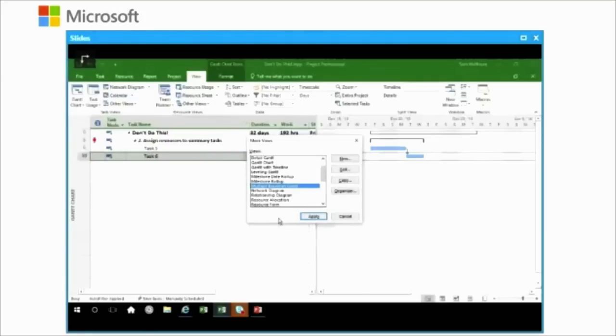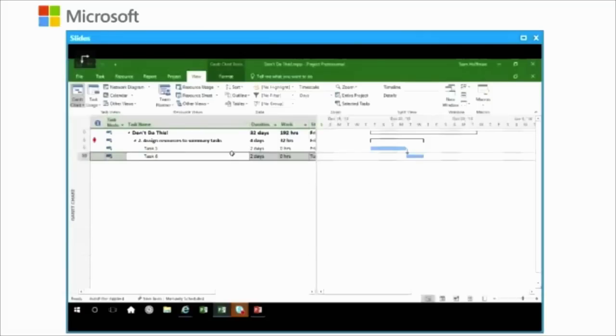Larry says, can you utilize the resource calendar within Outlook to avoid booking an employee while they are attending non-project meetings? That's a great question, and in general, the answer is no. However, if you were to incorporate in their calendar in project that those were non-working days, then the resource could not be assigned tasks within those specific days.